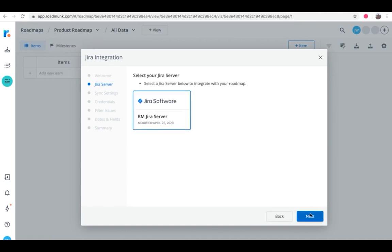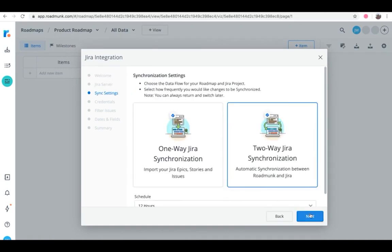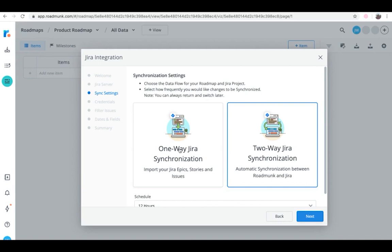Next, we'll go into the synchronization settings to choose the data flow from your roadmap and Jira project. You can either select one-way Jira synchronization or two-way Jira synchronization. A one-way sync pulls data from Jira into Roadmunk and essentially makes Jira the source of truth, while a two-way sync automatically syncs back and forth between Roadmunk and Jira. This allows you to make updates and push new items from Roadmunk to Jira.